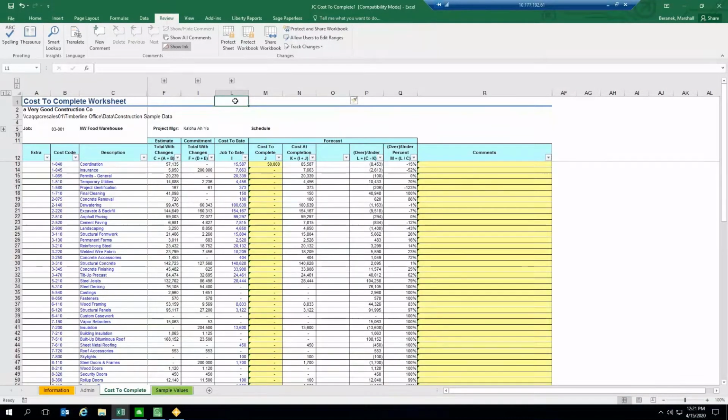Only that what someone does with this information is the second part. So there's two parts. One is what the report would look like. So this is just one flavor, but some people forecast at a lower level at the category if they use categories. Some folks forecast cost at completion or percent complete or hours to go if they're at a category level.